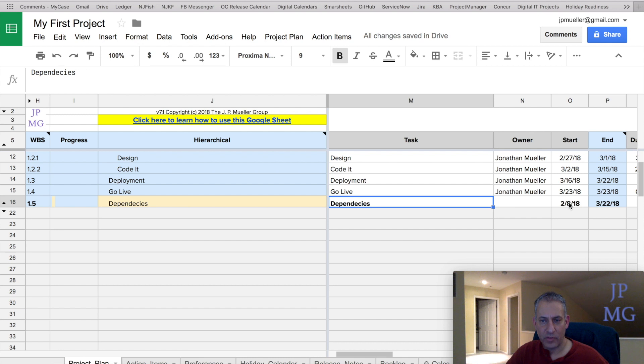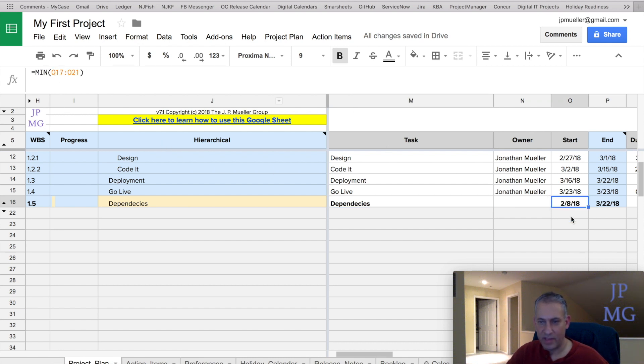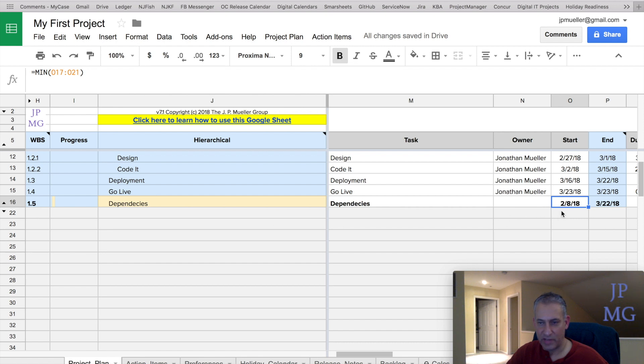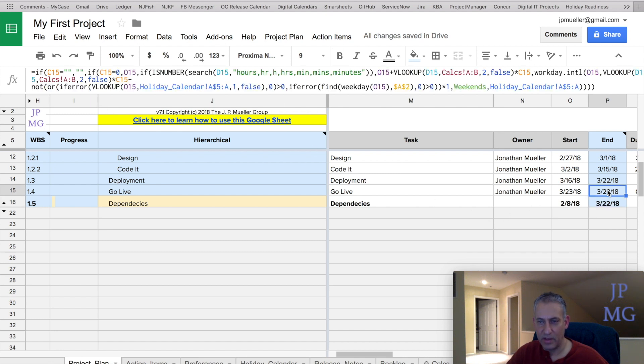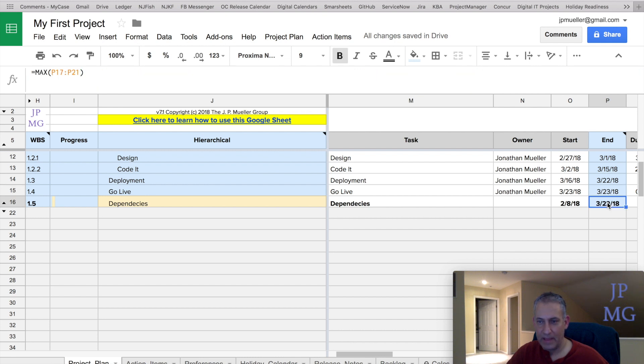Well, first of all, it inserted a formula here. It said, take the minimum of everything in O17 to O21, which were all the children tasks. And it also overwrote the end formula with max P17 to P21. Normally there's this big wonky formula, and we overwrote it.